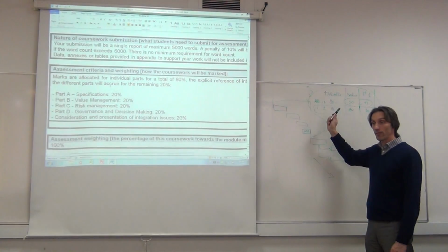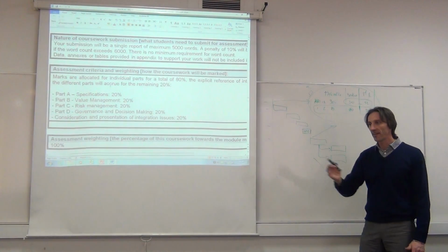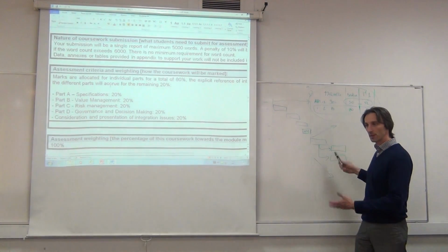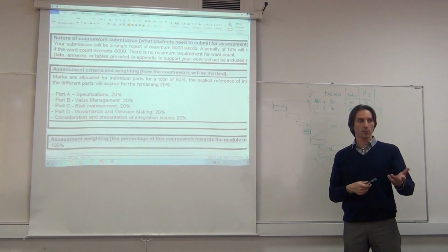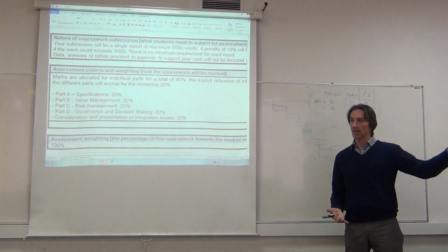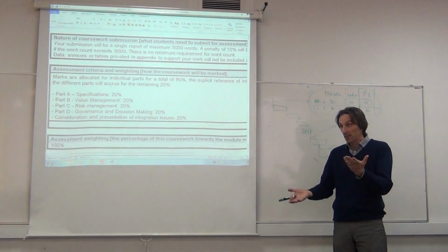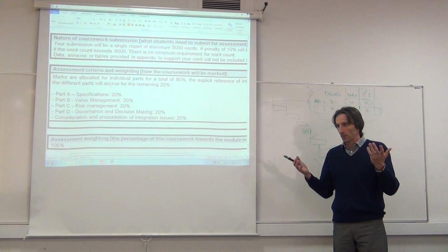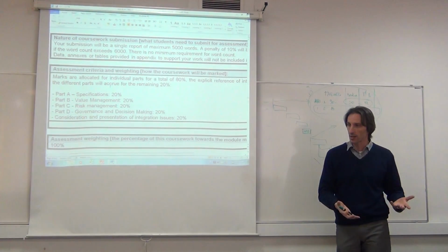In this case, I'm confident because I know that these types of projects are linear, so I don't have to have this process of rebalancing the budget in place. But this is a complicated project. It has IT and it has infrastructure. Maybe I'll need to rebalance the budget at some point, because one can be very volatile and one is crucial. If I don't get that, everything falls down, right?